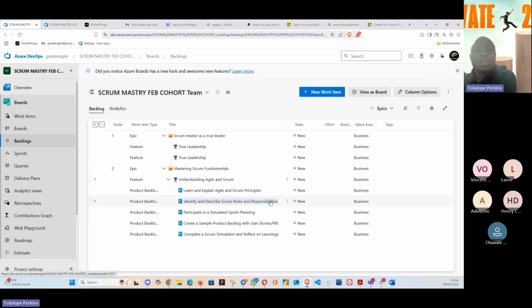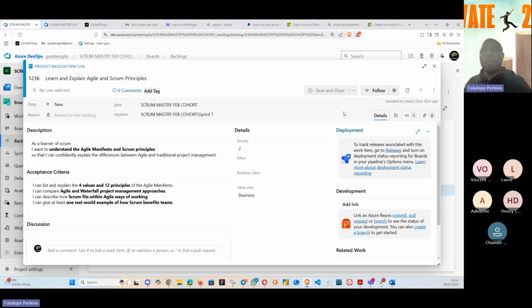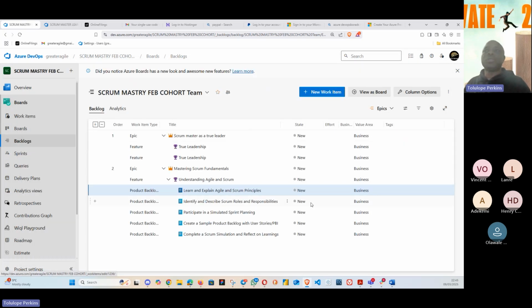So it's done continuously, especially by the product owner, and then at least once in a sprint by the product team or those who are getting the work done. They come and put their eyes, they come and say that everything that we are doing meets the definition of ready. If that is done, the next thing that usually happens is for us to go into sprint planning.